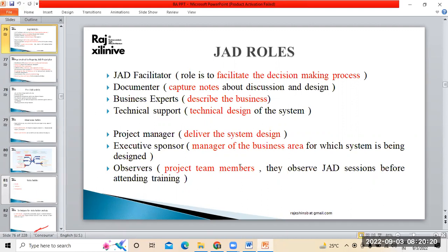What has happened so far? Right. So there will be three things. At the end of the day, when we have discussed something, the final conclusions are only three. One, we may come to a conclusion that it is accepted. Yes, this is what is accepted. Second, no, so it's a complete rejection. Third is deferred. Deferred means it is a status quo, I can say. Status quo kind of stuff.